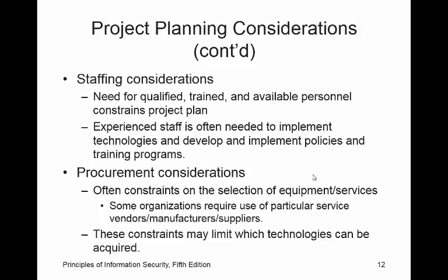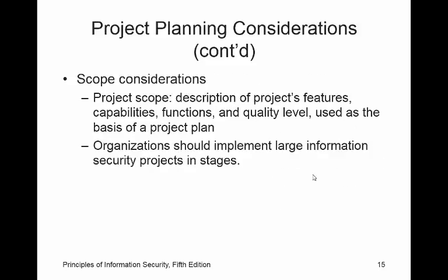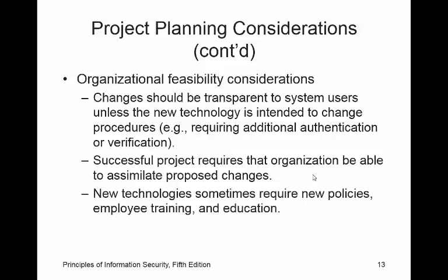Then let's see. I wanted to make sure changes are transparent to everybody. Sometimes, just like I was just saying, it requires new policies. There is a gap analysis, and I didn't see it on the PowerPoint. It's when you compare the measured results against the expected results, and that's one of the things that you've got to build into this analysis. How good was the planning at the beginning, and did you attain what you really wanted to attain?